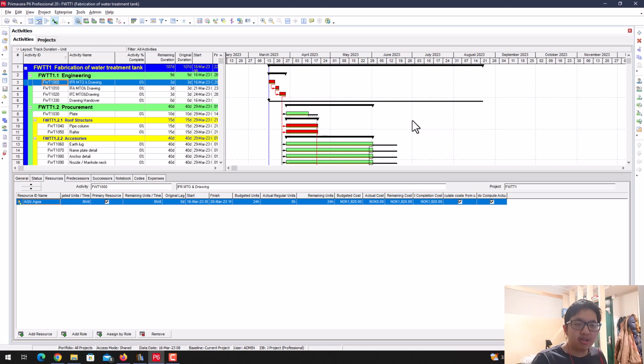In this video, I will tell you about OBS and the resource in a project. We can create the resource first and then create the project afterwards, or we can create the project and then create the resource and match them together. It's up to you. But usually, if you have a global resource, you can create the global resource first, and then you assign the resource to the project. So let's get started.